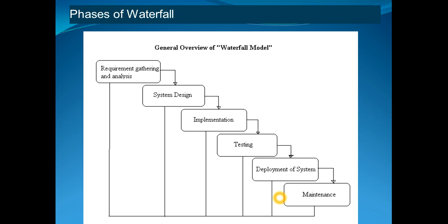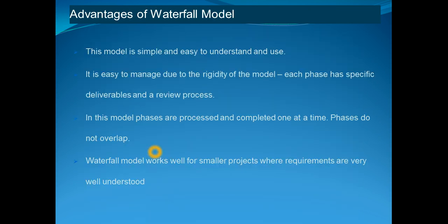After successful completion of deployment and go-live, the next phase is maintenance, in which the vendor provides all types of necessary support to the customer. As you can notice from the figure, all phases progress in the downward direction with no movement in the upward direction — this is the main feature of the waterfall model.